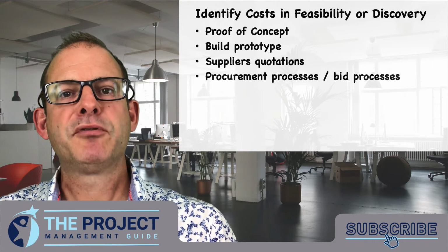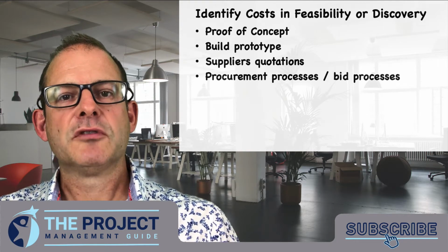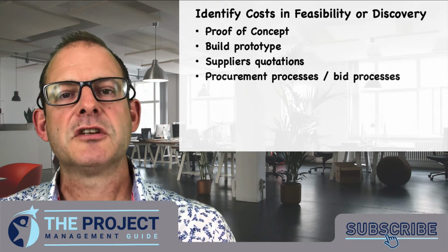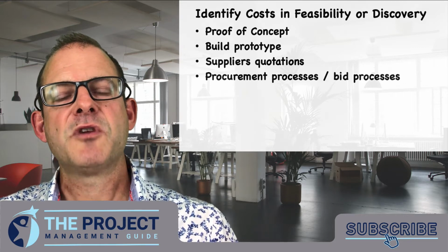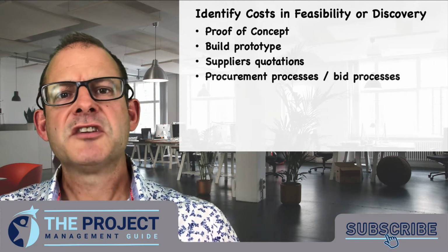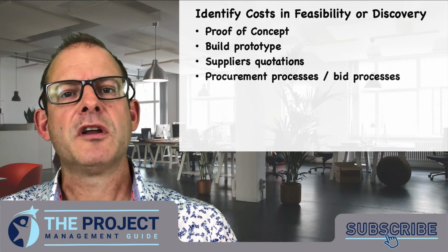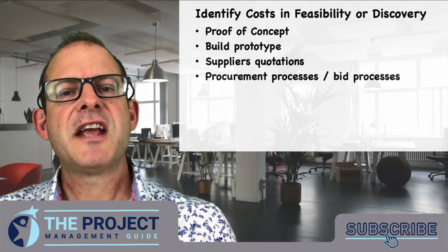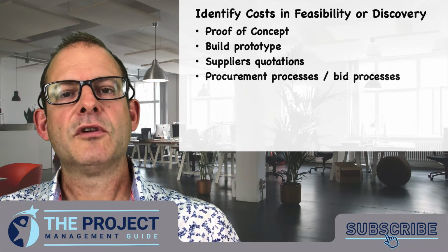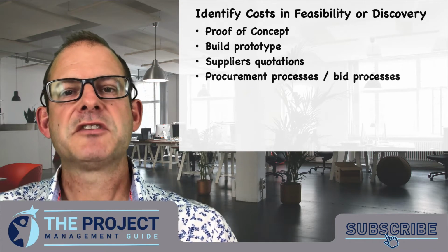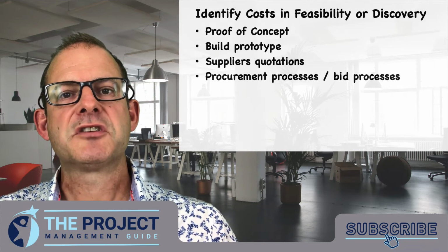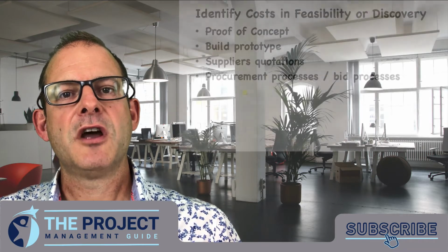If we're buying a product or a service, or a big system off somebody, we might need to go through a process of quotations or some sort of procurement process where we compare the pricing and the services offered by a number of suppliers. Typically that might take several months to organise, and it's quite a labour-intensive piece of work to get the costings all together. So it's quite a big piece of work to run a procurement process as well. But it helps us bottom out what our costs are on our project.